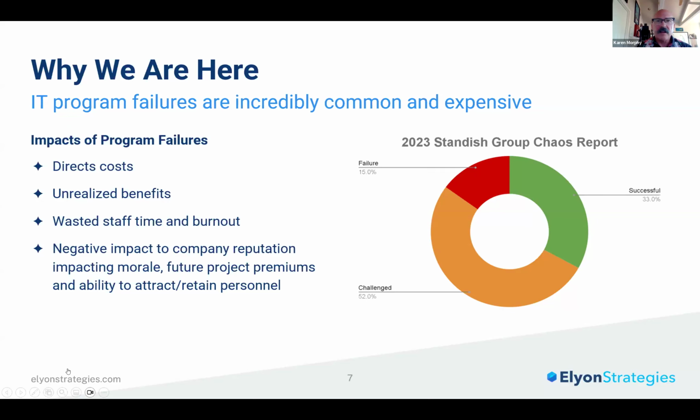It was basically a state government project to overhaul and modernize IT systems, human resources, payroll, things like that, across all of the Idaho government agencies. It faced significant challenges. The launch caused lots of procedural errors, data errors, disruptions to the operations of the state, and criticism from legislators. The root causes they determined were challenges in getting the change management portion of the program on track, and the readiness of both the users and the workflows.